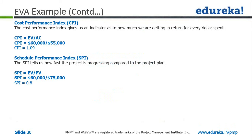We will calculate your cost performance index (CPI) and schedule performance index (SPI). The formula for CPI is earned value divided by actual cost, and the calculated value is 1.09. Any value greater than 1 is good news — your CPI of 1.09 means you are spending less than what you had planned for. Your SPI, using earned value divided by planned value, is 0.8. Any value less than 1 is not good news. The benchmark for both CPI and SPI is 1: less than 1 is bad, equal to 1 means you are on track, and greater than 1 means you are ahead of schedule.